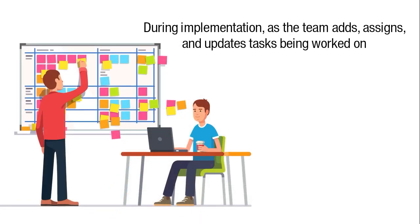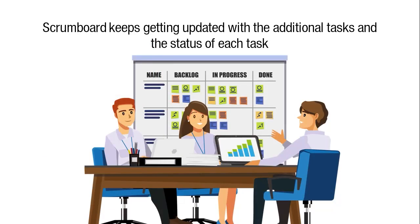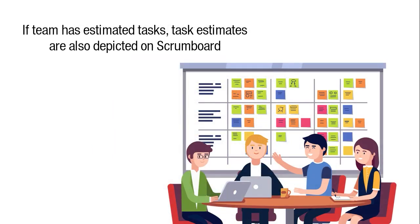During implementation, as the team adds, assigns, and updates tasks, the scrum board keeps getting updated with additional tasks and the status of each task. If the team has estimated the tasks, the task estimates are also depicted on the scrum board.